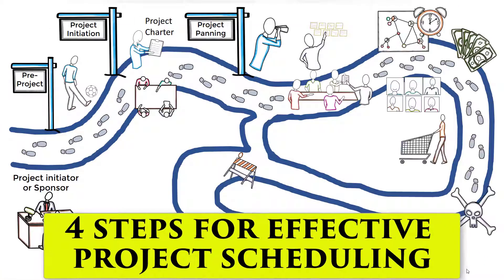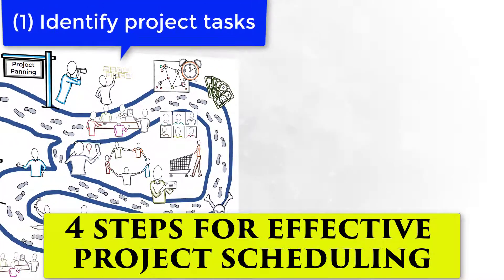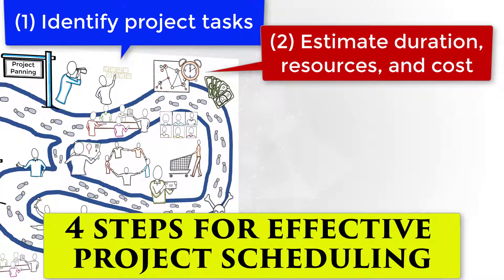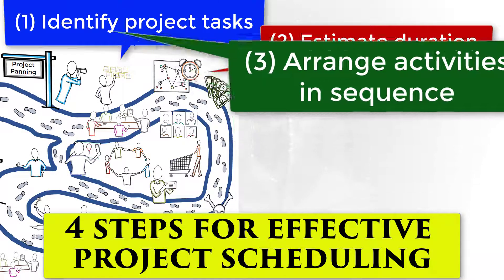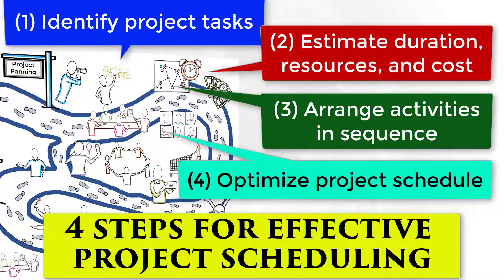In this video, we saw four steps for effective project scheduling: 1. Identify project tasks. 2. Estimate durations, resources and cost. 3. Arrange activities in a sequence. 4. Optimize project schedule. It was just an introduction — my intention was to provide an overview and help you understand the project scheduling activities as they are presented in technical books such as PMBOK.